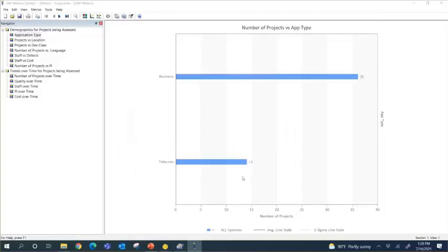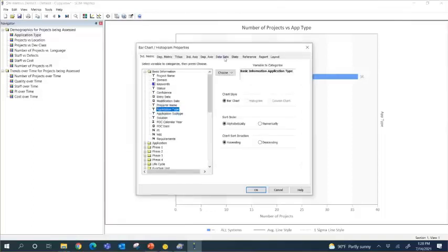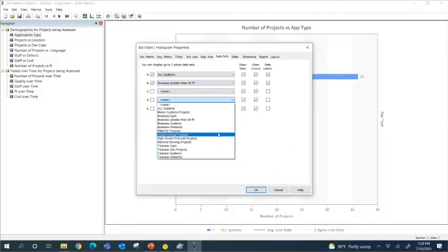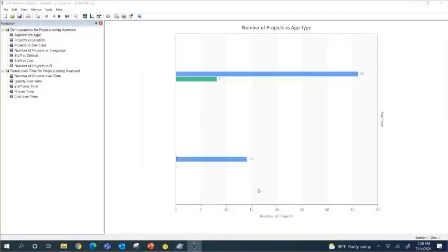Great. I got that initial view here showing me 36 business applications. I'm going to right click on the chart and bring in the data set that I just created. I'm going to say okay, great. So there we are. Now visually I can see that out of those 36 projects, 8 had PIs greater than 20. For my organization, that might mean those were the high performers. I want to take a closer look to see why we did so well, so I can repeat the process.